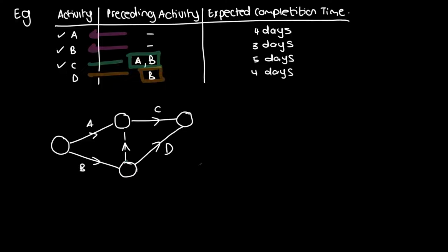But we're not finished yet because we haven't numbered the events. So remember, when we number the events, we're going to label this one 1. And then we're going to go to the next level. The next level is basically where the nodes of these adjacent vertices are, so you have one edge between them. And this is the next level. So it's these 2. And we're just going to go in order, so this will be 2 and this will be 3. And then we go to the next level. In this case, there's only 1 left over, so we're going to number it 4.